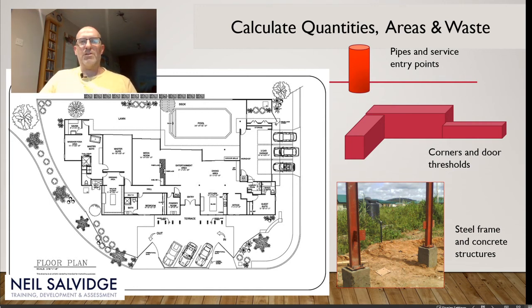Often, if you're using self-adhesive detailing on these, you'll be getting through quite a lot of material, on every detail, X amount of square meters, 0.9 meters of membrane if you're using a 300 wide roll, or cutting down from a 1 meter roll to the sizes you require. So they're all things that we look at. Has that been calculated?